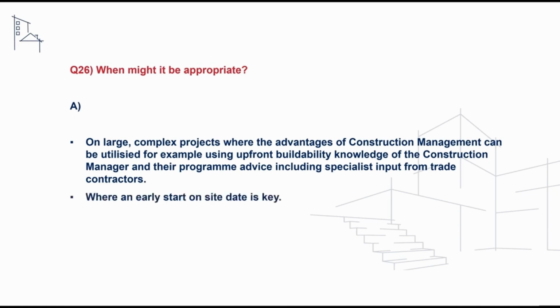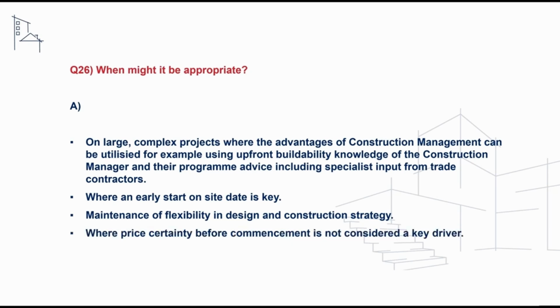It can also be beneficial where an early start on site is key and where maintenance of flexibility in design and construction is important. Price certainty is not considered to be a key client driver, and it's also appropriate where the client is experienced in construction projects as they have an expert team of consultants to manage, and they may also be involved in managing each of the trade packages directly.